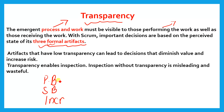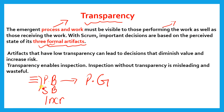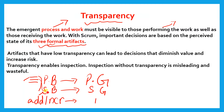The Product Backlog — who is responsible? The Product Owner. He writes all the items here, and when all items are done it is called the Product Goal, meaning we have achieved our goal. The Sprint Backlog is where from the Product Backlog we pick one, two, or three items — whatever the Scrum team can do in one sprint, where the sprint length should not be more than one month. When we finish that, it is called the Sprint Goal. The Increment means when we finish one sprint it adds value — each sprint adds value, which is called the Increment.